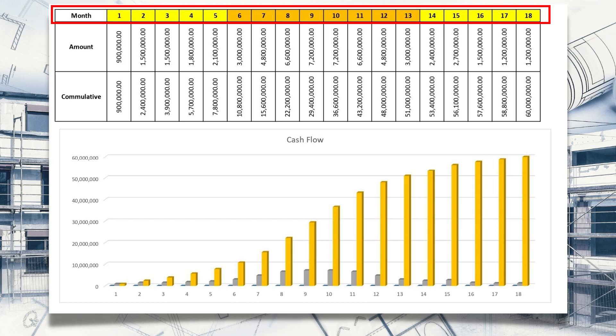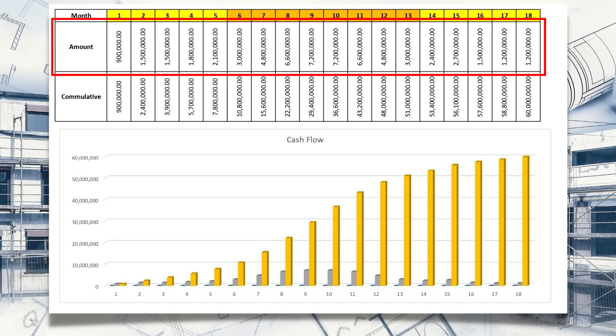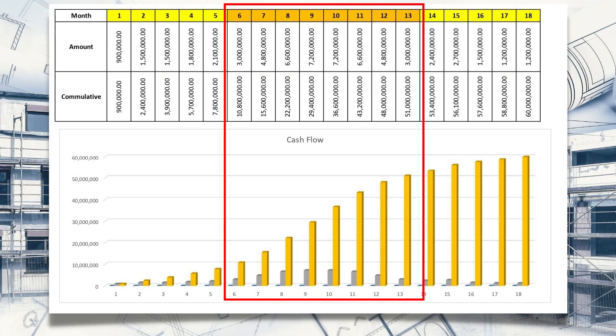Let me show you on screen an example cash flow. The duration of this project is 18 months. The second row shows the total worth of works executed month-wise. In month one we will execute 900,000; month two 1.5 million; month three 1.5 million. The values increase as the project progresses, reaching a peak in the middle — this is where the client is paying the most, or where the contractor is executing the most activities simultaneously.